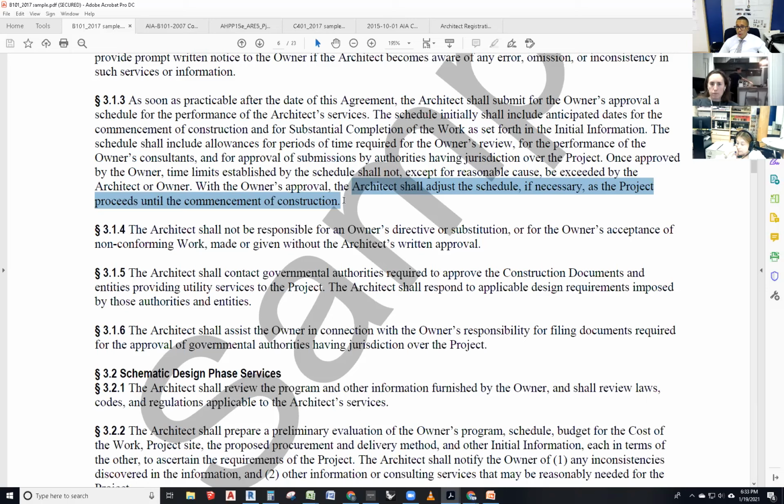For the A201, when construction begins, there is somebody else that creates a schedule, and you gotta administer that contract and ensure to some extent that things are being done properly. But that schedule is not your problem. This is your problem. Your construction, your architectural services, right?